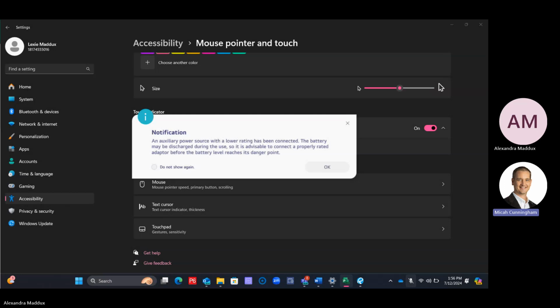So if you had the start to start plus 1, and then it only takes 2 days, your start date of the rebar slab is still the same. So that's the backwards tracing reason why I don't use it. But I'm not here to tell you don't use it. It's up to you guys if you do or not. But it can cause you issues if anything is shorter than planned.